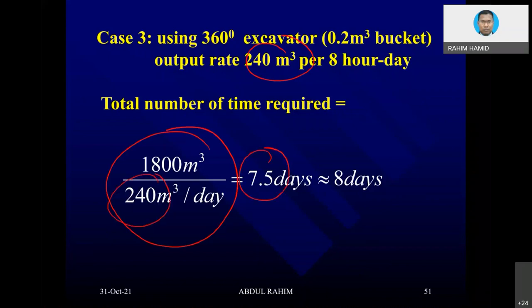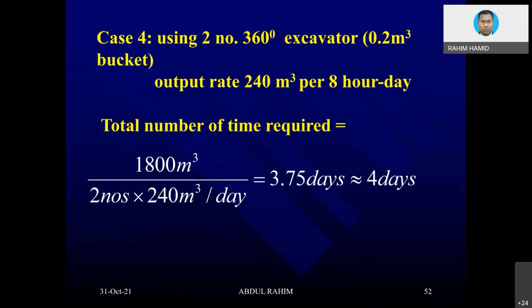Instead of using manpower, we can replace with a machine. One excavator with a 0.2 cubic meter bucket size has an output capacity of 200 cubic meters per day, so 1,800 divided by 240 gives 7.5 days — we round up to 8 days in scheduling. Using machinery might be a little expensive but if you reduce the time, those costs are compensated. Using two excavators instead of one reduces from 8 days to 4 days.